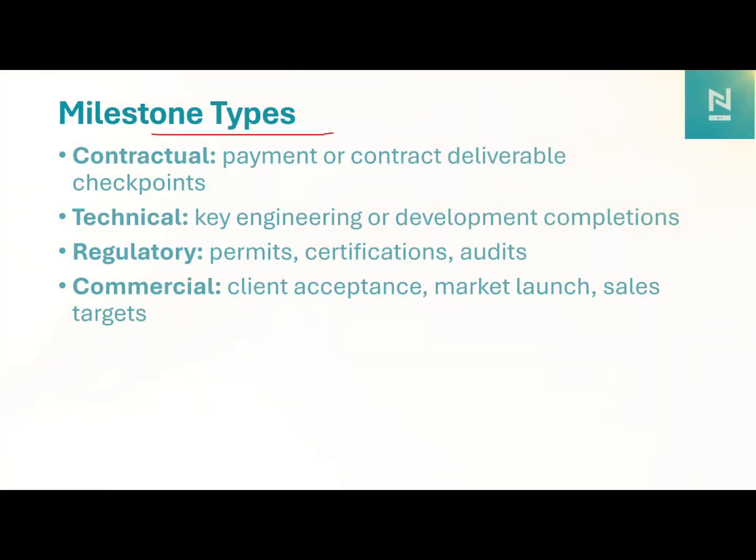Milestone types. There are a few milestone types that I have given here. One is contractual, which may be a payment or contractual delivery checkpoint. If we complete a certain activity, then the payment will be done. If you submit the IDEA report, then a certain payment is done. After the approval, a certain payment is done. So that can be a milestone for the project.